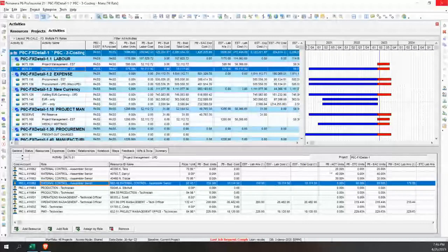So this is something that P6-Calculator in this scenario is going to do for us automatically. Okay, so we didn't get any timesheets against this one role because there is no person that is this role. These are the folks performing that role. So we don't have any actuals against them, but we need the forecasting, the estimate to complete, to understand how many hours is that? 90 hours are related to this 150, okay?